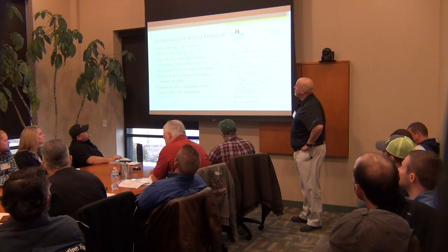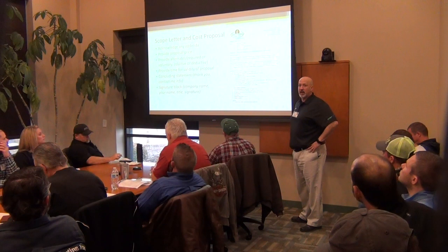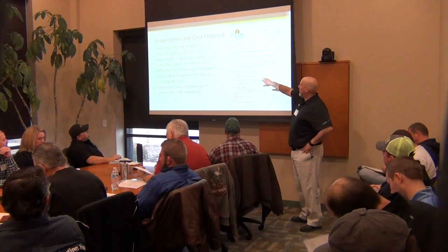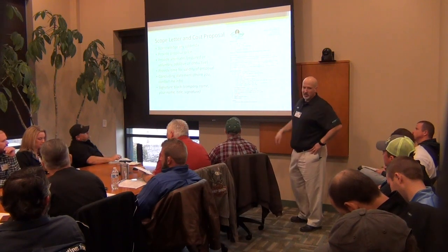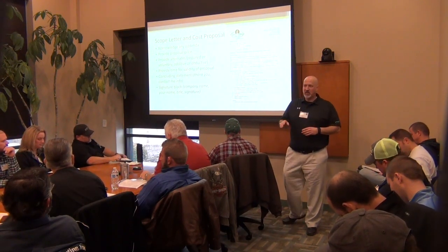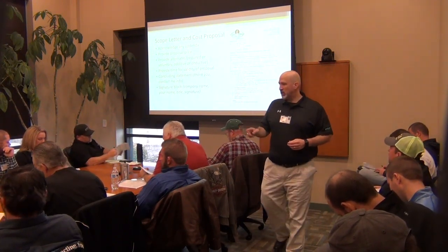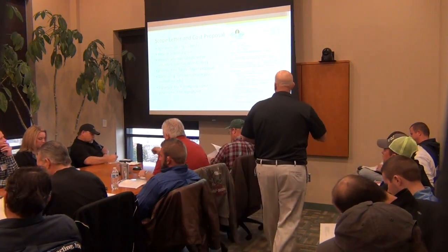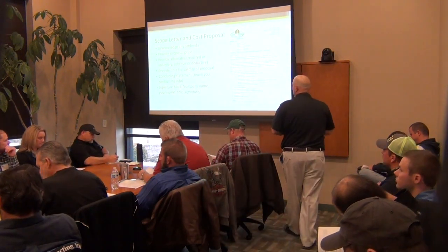All right, moving on. Be sure to acknowledge any addenda that came out. Somewhere on the second page, I had a way that I could click this and scroll it, but it's not working here. But anyway, on the second page, I think you can see where we say there are no addenda acknowledged on this one because there were none issued. But find a place towards the end of your proposal, make a little tagline and say, hey, we acknowledge addenda 1 through whatever, or no addenda provided.